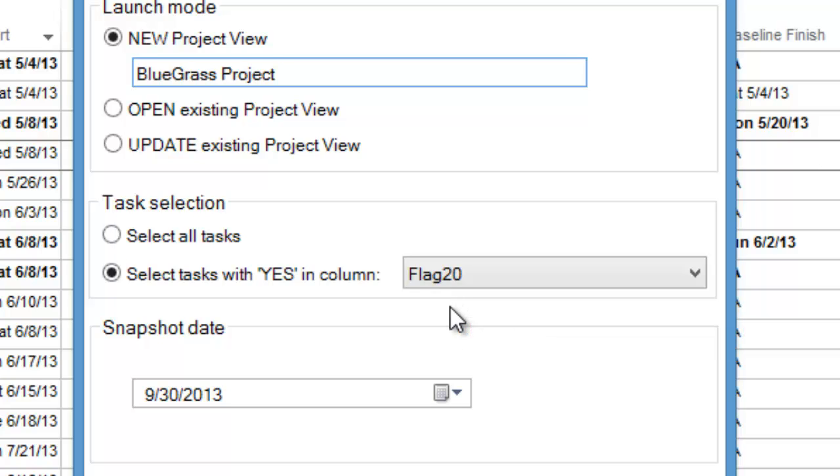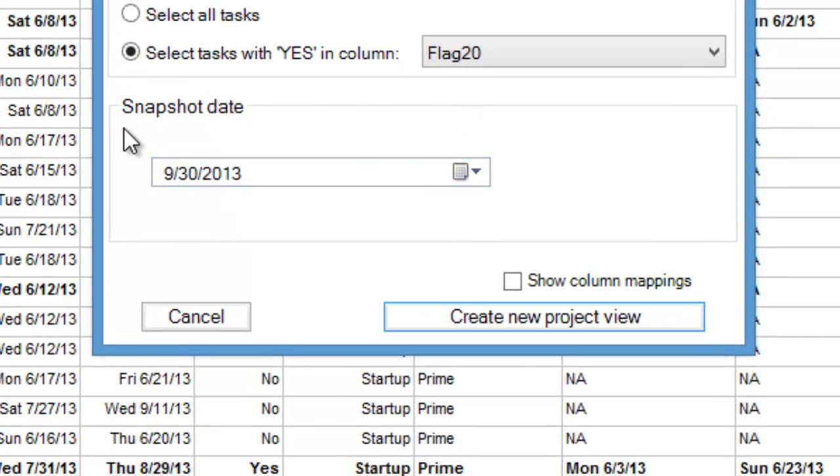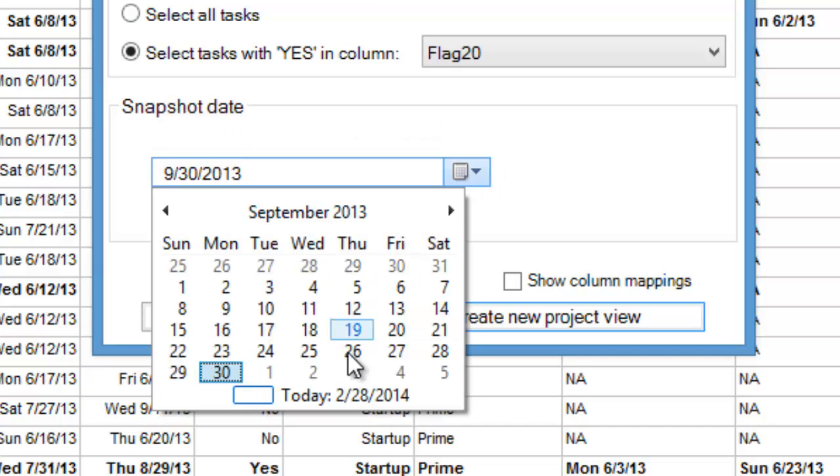You can also specify a snapshot or status date of your project plan. In this example, we'll use today's date.